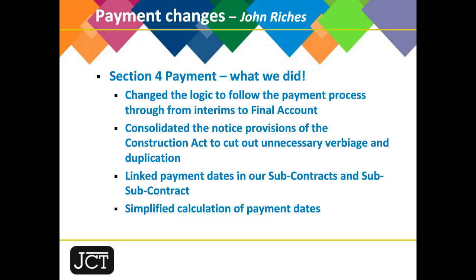We've linked the payment dates through in our subcontracts and sub-subcontracts, and we've simplified the calculation of payment dates. And what we've done on payment dates is grasp the nettle, as it were, and invited the parties who fill in the contract particulars to put a date in for the first interim payment, and then all other interim payments follow that date.